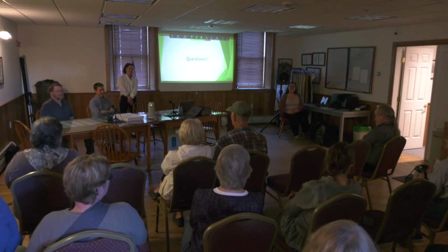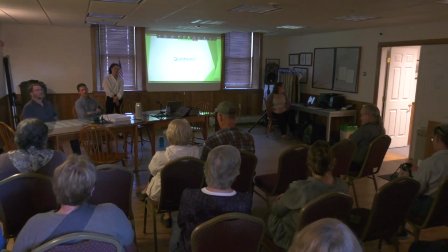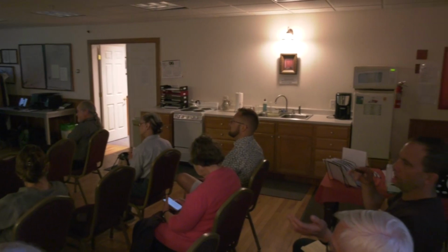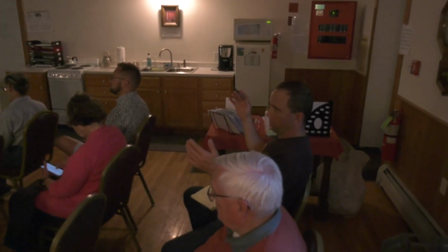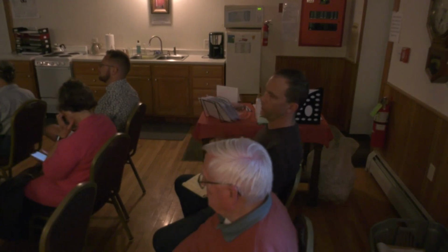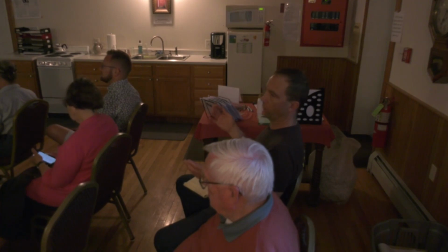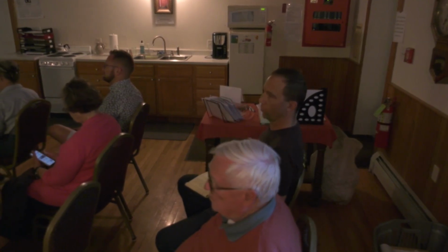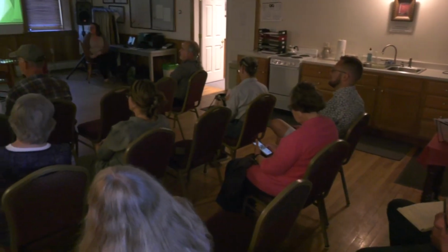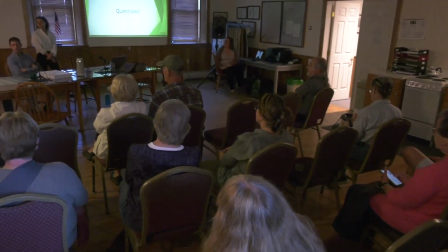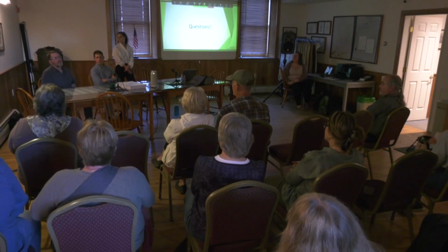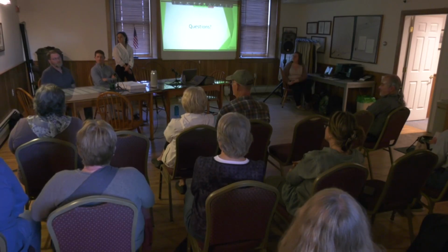And the back. The road markings or survey markings are out pretty wide on that western end of Marshfield, from Maple Fields up to the village. And so we've had some questions about how much, if any, the road is going to be widened. Okay, I can see where there'd be some concern with that. What those people are seeing are grade stakes with the orange ribbons on them. Those are control stakes for us. Most of those stakes are at our 25-foot right-of-way, and those are offset stakes for the center line. Gotcha.